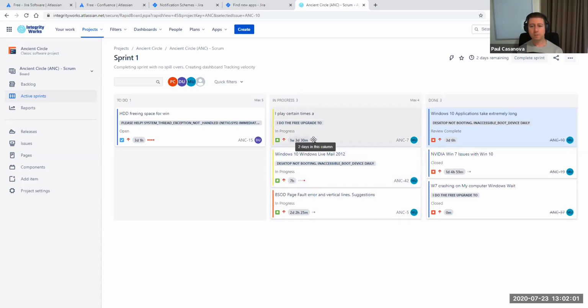And it's probably a really powerful indicator to take into a retro. When you have a retrospective, if you look at the cards that had been sitting for a long time, it gives you a good point of reference for discussing further with the team. Say, okay, we had these cards sitting there for over a week. What happened with that? And how can we learn from those cards and the things that went wrong to make it better in the next sprint?